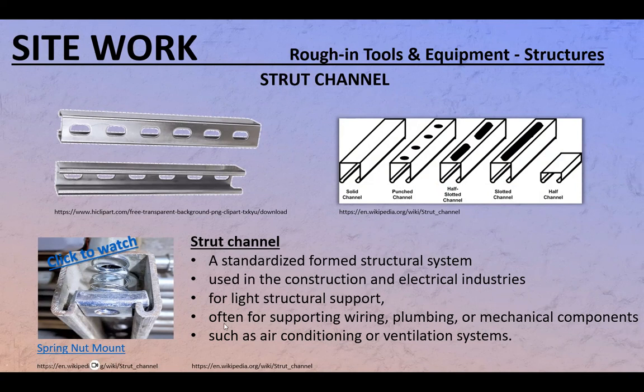As far as cable trays, it's more efficient to just buy one and install it than lose the time on constructing it and then installing it. Well, some people don't understand that. They think, yeah, okay, we got people on site. They can make the cable tray out of the Unistrut. They don't realize it takes time to do it, and you're still paying for the people's time. All right, often supporting wiring, plumbing, or mechanical components such as air conditioning or ventilation systems.